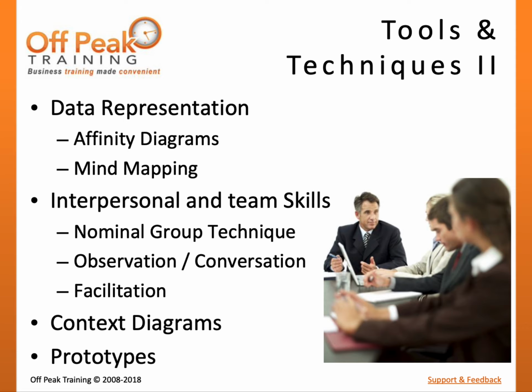When stakeholders cannot accurately describe their requirements, observation can be used to watch them perform a job function and identify their problems that need to be resolved by the product to be developed. Facilitation sessions bring together cross-functional key stakeholders to gather product requirements and establish relationships to improve communication. This exercise can help the cross-functional teams better understand conflicts and constraints that may exist between the groups and facilitate problem solving.